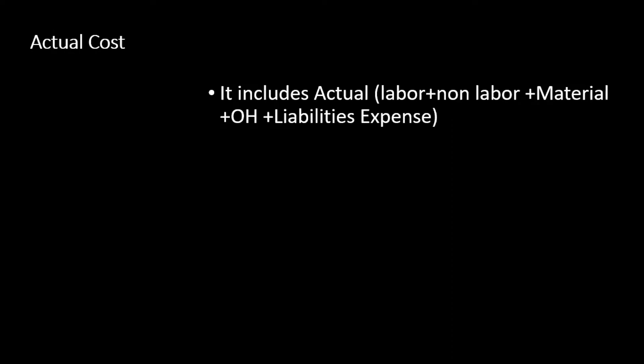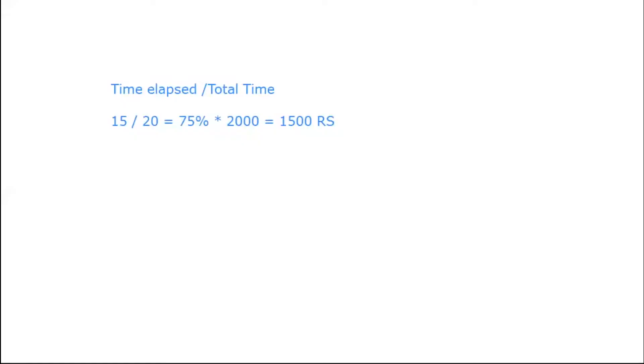Liability means your contractor has done the work but payment has not been released yet — it is still counted in Earned Value. The corresponding cost must be included in Actual Cost. Additionally, if you need a resource in execution that was not planned, the cost of that resource is also included in Actual Cost.